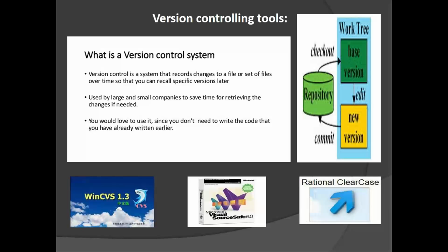Okay. Now, if you are not making a new version, what happens? You have done it in the same version, and after some days the client comes and says, whatever changes you have done are not giving me any advantage, so go with the old ones only, don't go with any new changes. Now, you did not maintain a version. So what happens? Whatever work you have done, everything will be wasted. Again you have to go back and start from the first.